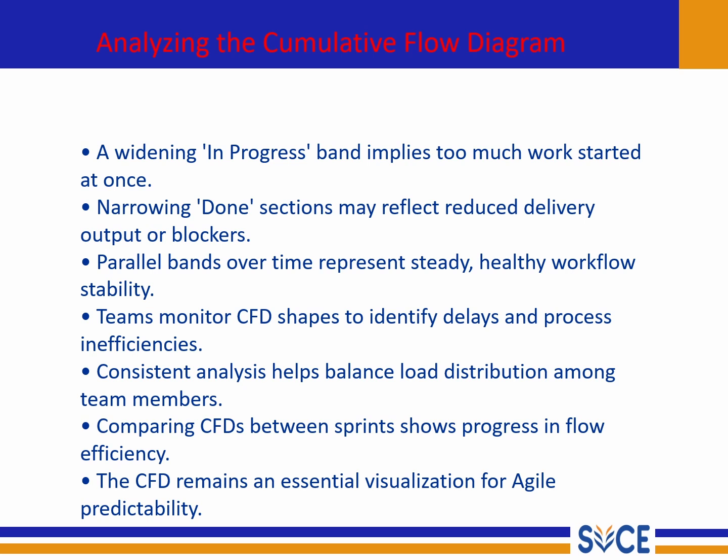Imagine again that each colored band represents a stage of the work, that is, to do, in progress, and done. Now what happens when the in-progress band becomes wider over time? That means too many tasks are being started at once but not finished yet. Just like opening too many browser tabs on your computer, everything is slowed down. It's a sign that the team needs to limit the work in progress and focus on finishing before starting a